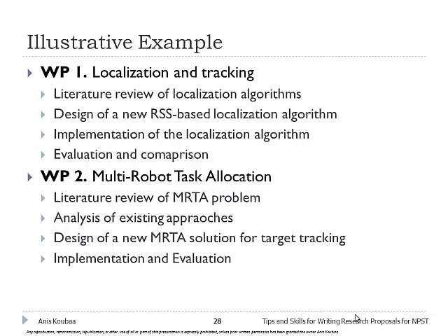project. And it has a title, like for example here we have work package related to localization and tracking, and then we subdivide this work package into tasks. So now from this you can understand that we have a big package that is subdivided into tasks. We will make a literature review on that area, then we will design a new approach for localization, then we will make an implementation, then we will make an evaluation. So this is a defined work package that will be done within the project.